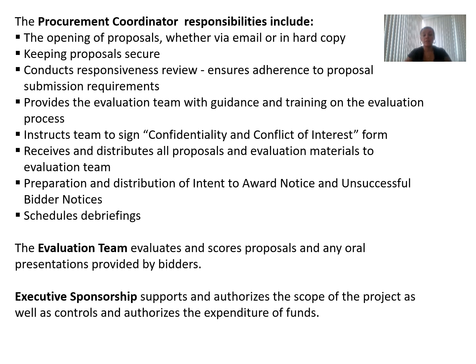Then the evaluation team evaluates and scores the proposals or any oral presentation provided by the bidders. That will depend on what is defined by the procurement team. And then the executive sponsorship supports and authorizes the scope of the project. This was defined before. As well, it controls and authorizes the expenditure of the funds. And it's a kind of independent endorsement of the selected bidder or bidders.